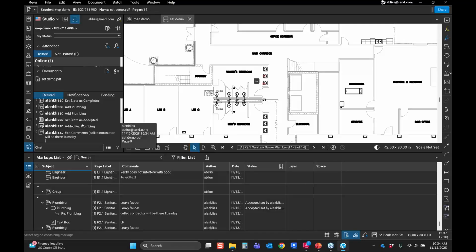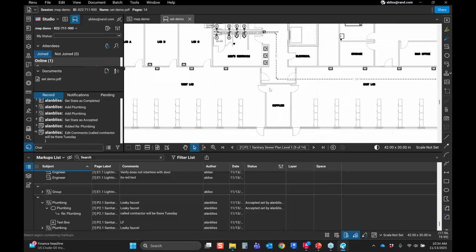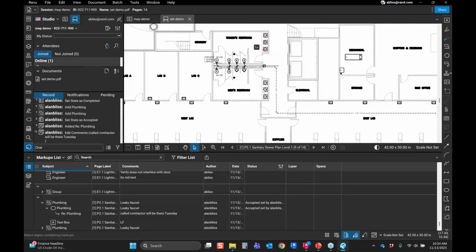And then, to keep these from getting too big, you can have this live session open for a week. When it's all done, close it, save that PDF out, and log it somewhere: that was the second week of November's field to office on the lab project we're building. Then in week 3, you open up a new session, and you have all the comments going back and forth to the field for week 3. When you close the studio session, you can download this PDF out with all of this stuff logged into it.